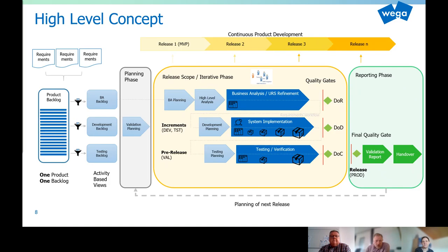Okay, so to become concrete, here you see our high level concept that we came up with. There are four basic ideas behind it. First, we do not think in project phases, but in releases as part of continuous product development iterations. And we sum up several of these increments to a fully validated productive release. All validation relevant artifacts and documents will be created on a release base.